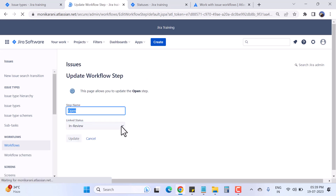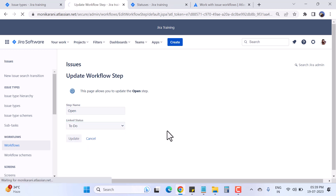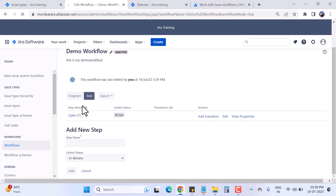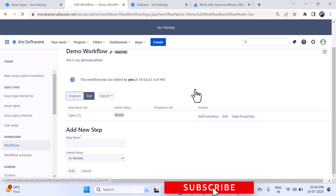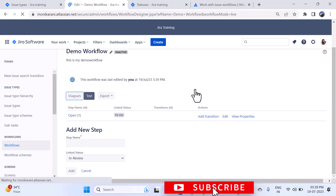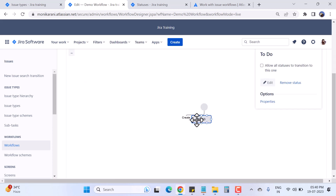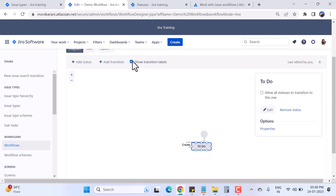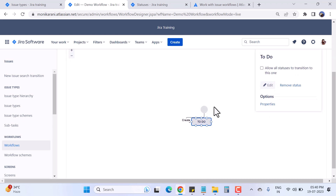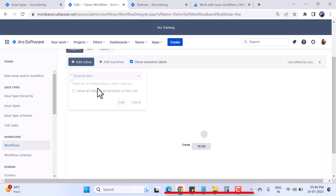I want to change the linked status from In Review to To Do. I'll click on it, select To Do, and hit the Update button. Now the step is Open and the linked status is To Do. Coming back to the diagram view — it's easier to explain there. This is my To Do status with the transition Create, and I can click Show Transition Labels to see the transition name.